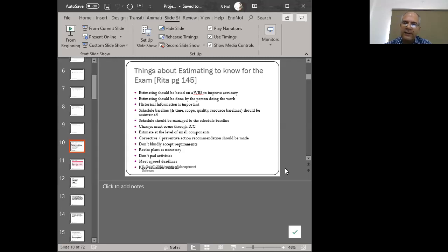On the other hand, you could have a change order, in which case somebody is saying to you, you must do this in that particular way. So in that case, you still evaluate the impact for it and you plan for it and then you integrate it into your baseline. But it's not happening without thought. Whether it's a change request or a change order, this thought pattern has to be there. And once that thought has been defined and the evaluation has been done, we integrate these changes, right?